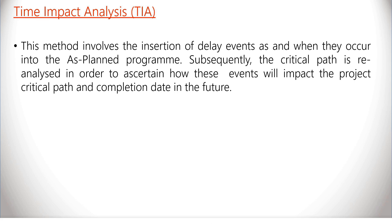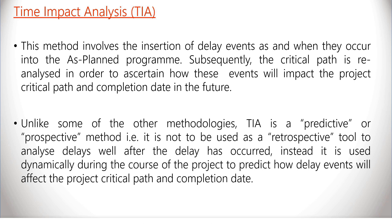Unlike some of the other methodologies, TIA is a predictive or prospective method. In other words, it is not meant to be used as a retrospective tool to analyze delays well after the delay has occurred. Instead, it is used dynamically during the course of the project to predict how delay events will affect the project critical path and completion date.